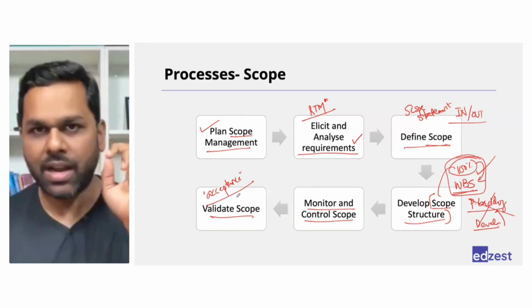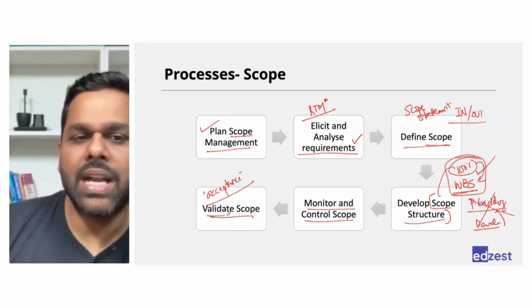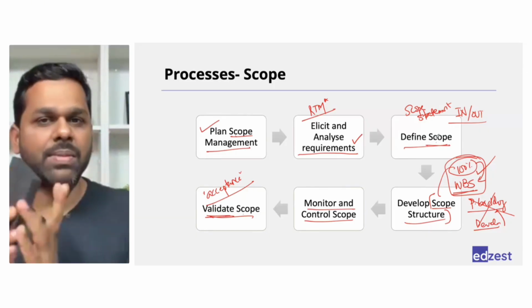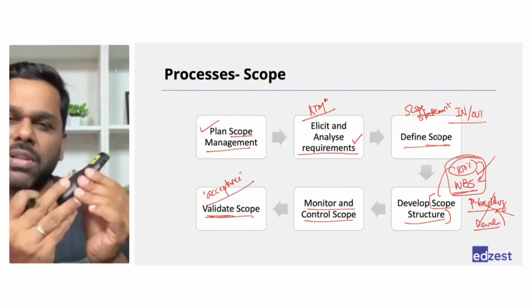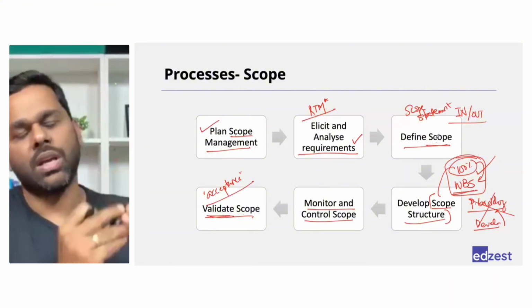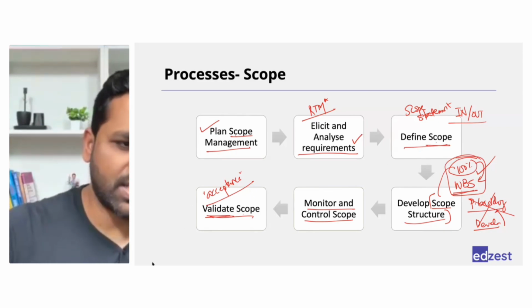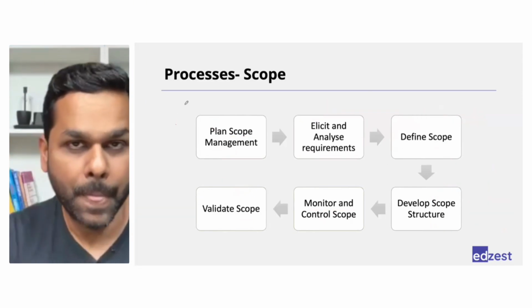Keep this in mind. I'll remind it again when we're talking about exam mindset, but keep this in mind that validate scope does not mean validating scope statement. It means validating the work that has been completed, not the document, but the actual work, the actual product that has been completed. We are validating this with the customer. Okay, so these are the processes, nothing but the same thing that we discussed in general activities.